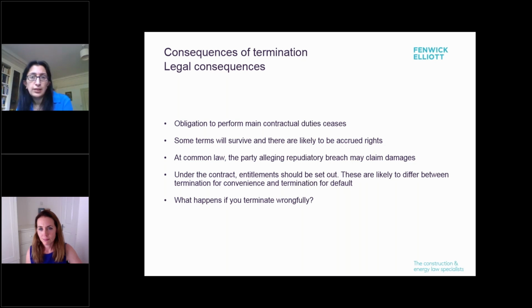The other thing that you need to take into account are accrued rights. And again, I think Lucinda touched on this. But if there has been a breach of contract prior to termination, then your right to sue on that breach or to recover the damages from that breach is accrued.